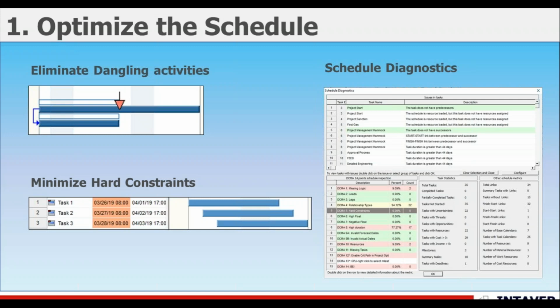Monte Carlo simulation requires you to run hundreds or thousands of varying models of your schedule. So each iteration is a new model, which means your schedule must update whenever dates or durations change due to risks or uncertainties.